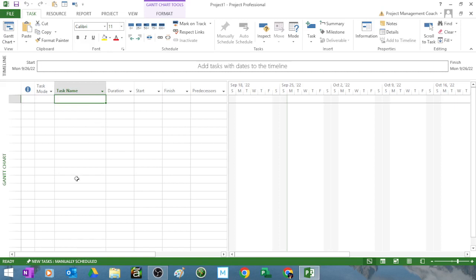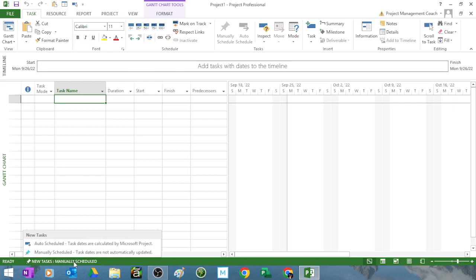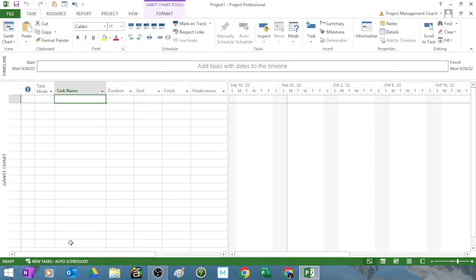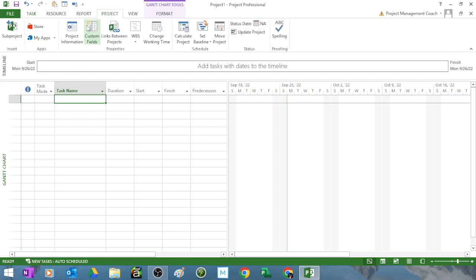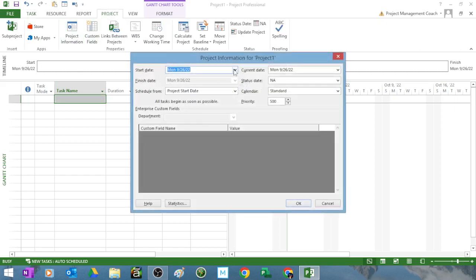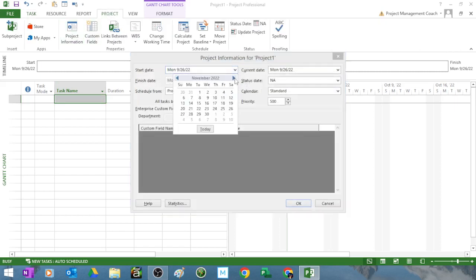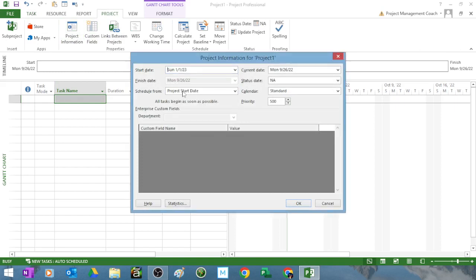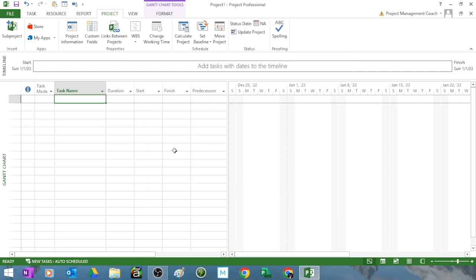First thing you want to do is click from manually scheduled down here, make it auto scheduled. Next thing you want to do is go to project and put in a start date. So let me put in a start date of 1st of January 2023 and okay. I know it's a Sunday, that's alright.